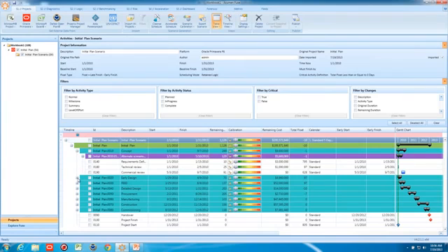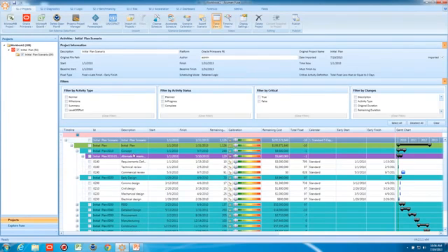It's creating a second version of the file, and we mentioned comparison earlier, understanding my optimized scenario versus my baseline scenario. And that's exactly what it's allowing me to do here: make changes to my activity duration calibration without changing my original plan. So let's expand out the scenario, which right now is a carbon copy of my baseline plan. And let's expand some of these areas.